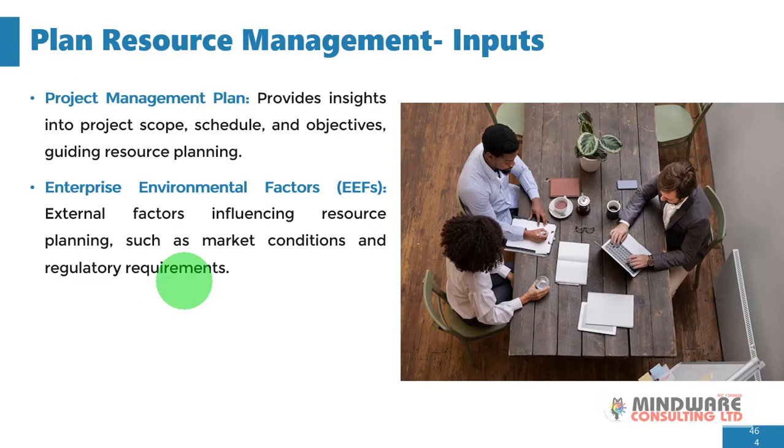For example, in Nigeria, we have what we call the local content regulation. In other words, if you have a project going on in a particular area, you have to ensure that at least a good percentage of the human resource that you're using for that project is from within that particular region, or that local government or area.